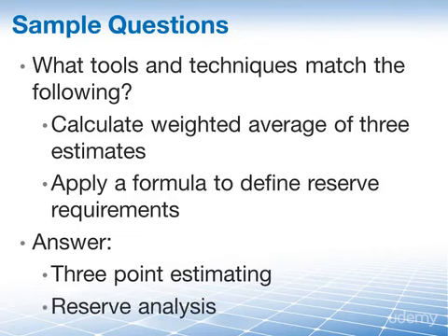And when you apply a formula to define your reserve requirements, for example, on all our tasks that have a risk of X, we're going to add 10% on top of that. This is your reserve analysis.